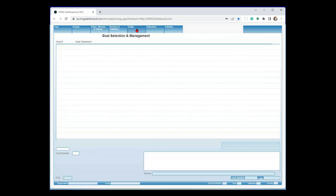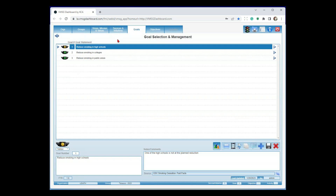For today, we're going to talk about tobacco cessation. Under tobacco cessation, we have a set of goals — pretty high level, not real specific. For instance: reduce smoking in high schools, reduce smoking in colleges, reduce smoking in public areas. When we get to the goal level, we start assigning traffic lights as a visual indication of status. We have four different traffic lights: green indicates things are moving along as expected; yellow indicates something is potentially going wrong, like a program lead retiring soon; red means we lost a resource, like COVID taking up all resources. Anytime you change the light, you typically put a note.